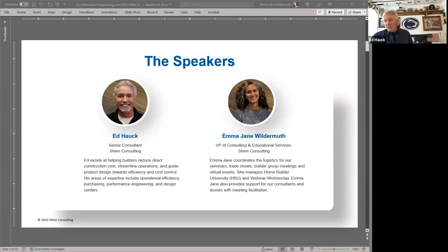I had a builder last year that, to get 200 square feet over top of a 600 square foot garage, had 8 parallels. The cost value on the 8 parallels was crazy to get 200 square feet. We redesigned that space more cost effectively to hold up that 200 square feet. And lo and behold, we got 300 square feet and spent less money. So my perspective is a little bit different than a lot of people in the industry.